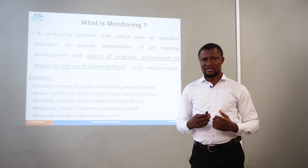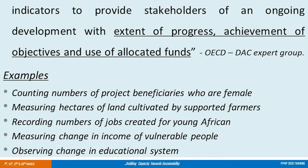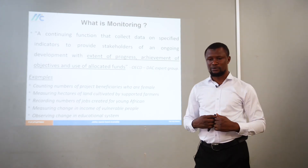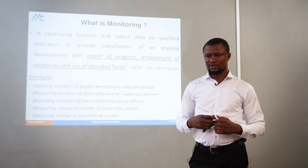Let's consider some examples of monitoring. Counting the number of project beneficiaries who are female — this monitors against key performance indicators of female beneficiaries, providing information on both the number of beneficiaries and the gender sensitivity of the project. Also: measuring hectares of land cultivated by supported farmers, recording the number of jobs created for young Africans, measuring change in income of vulnerable people, and observing change in the educational system.